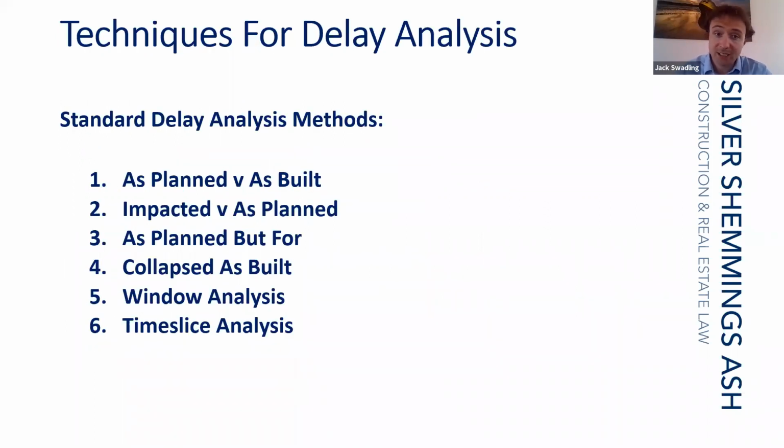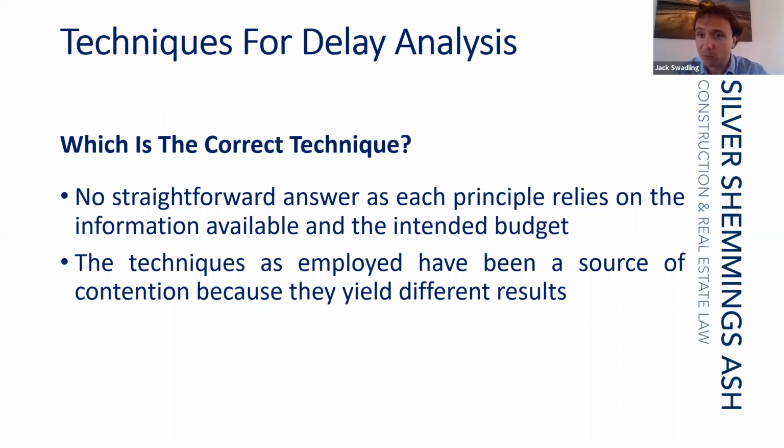These are different delay analysis methods. As matters stand at the moment, the court does not say one method is, as a matter of fact, better than the other. Whether or not certain types of analysis can be carried out will completely depend on what materials are available and what can be provided by the contractor to show its entitlement. So, yeah, no straightforward answer, as each method relies on the information available.